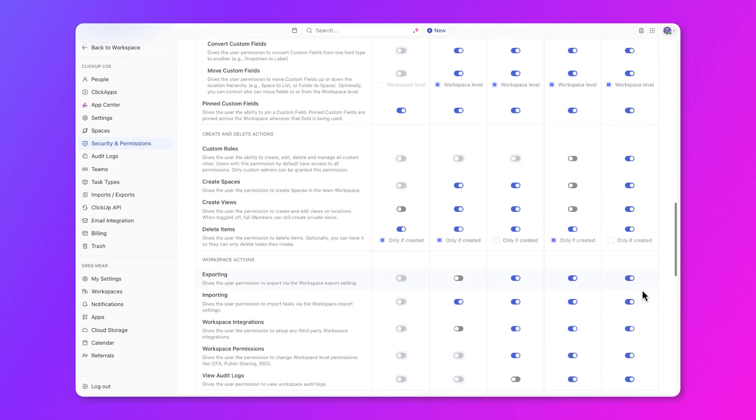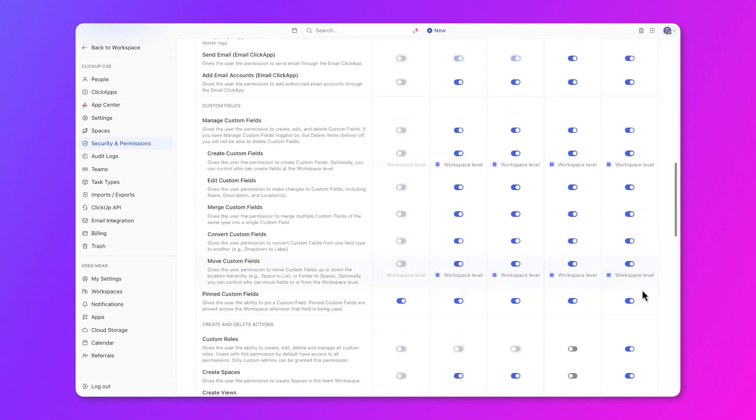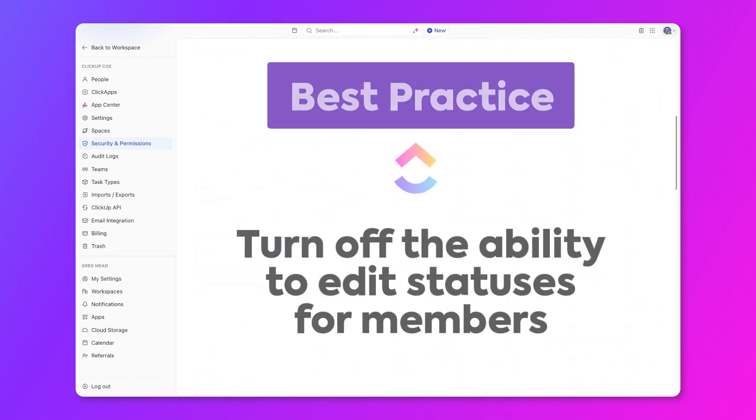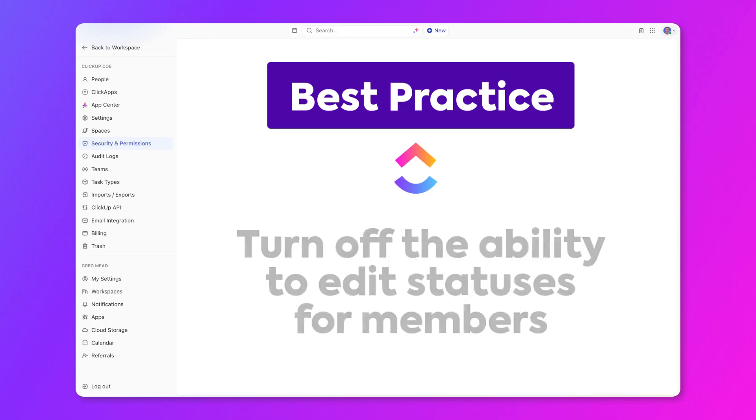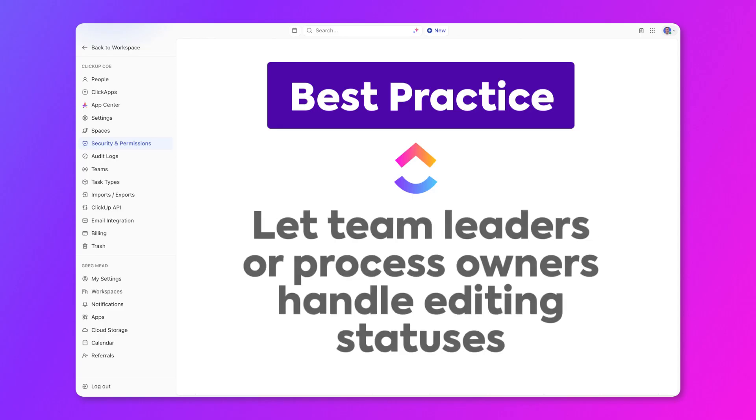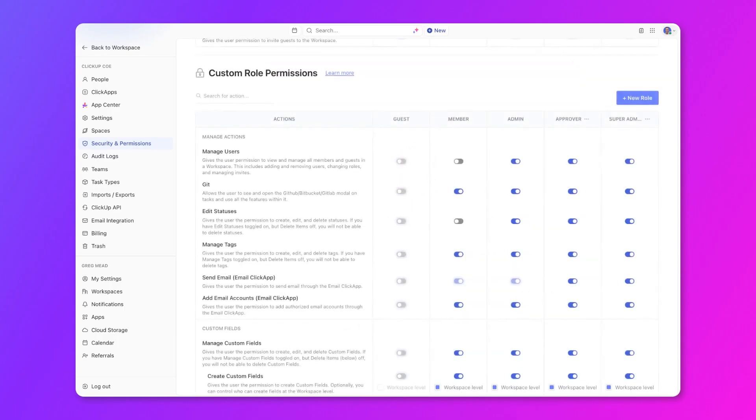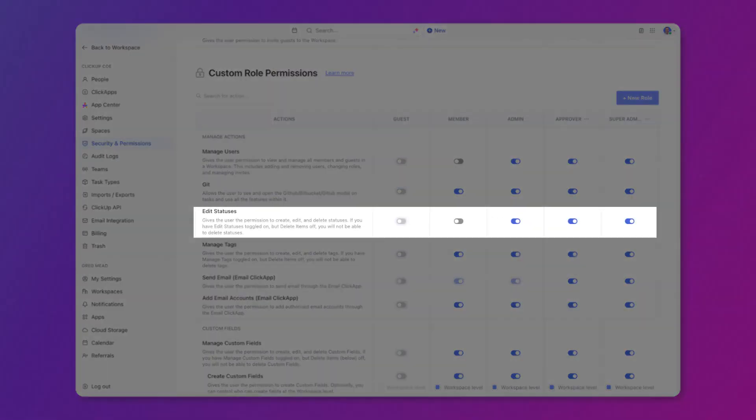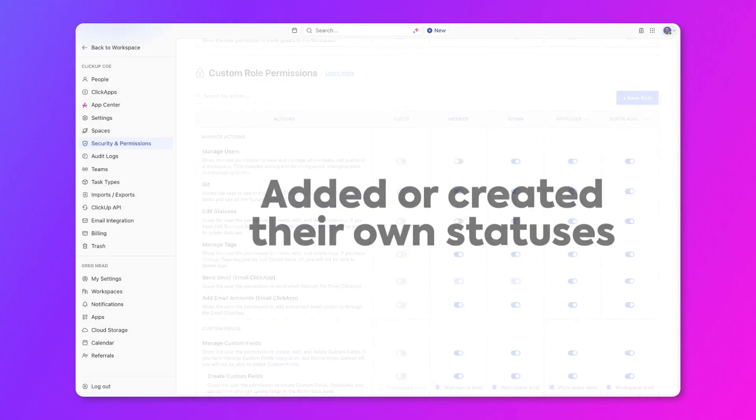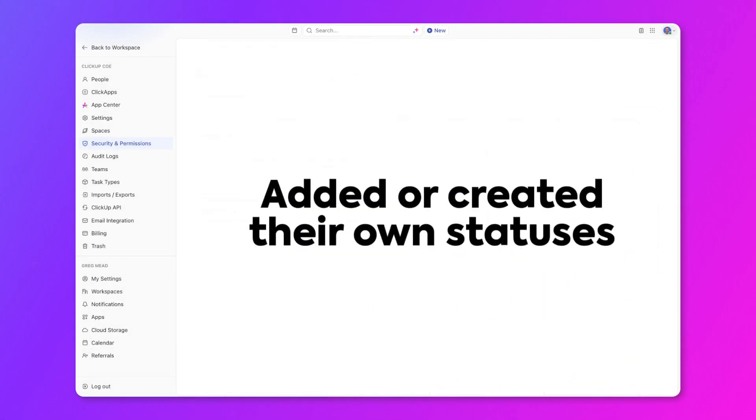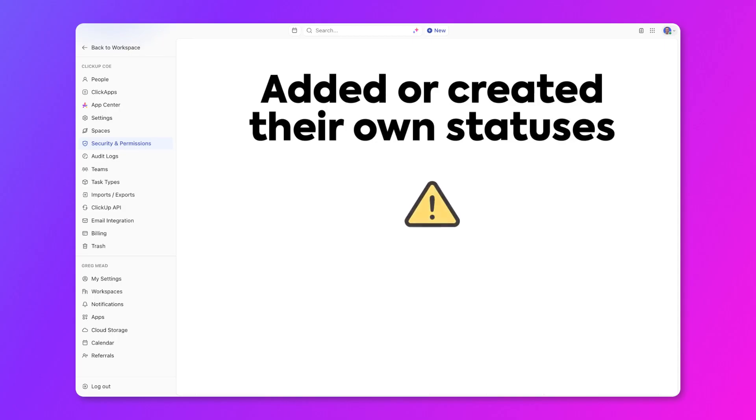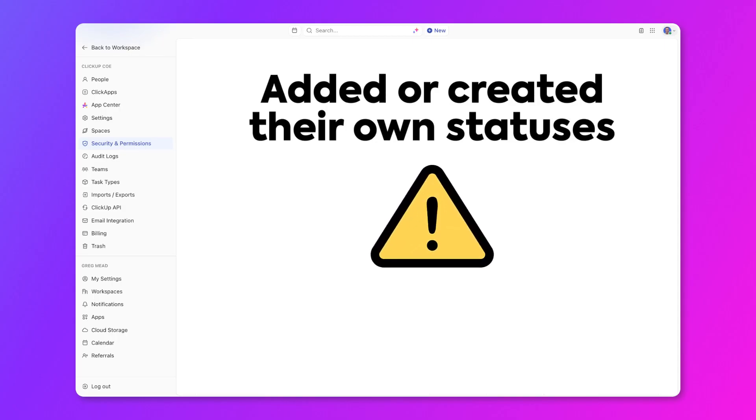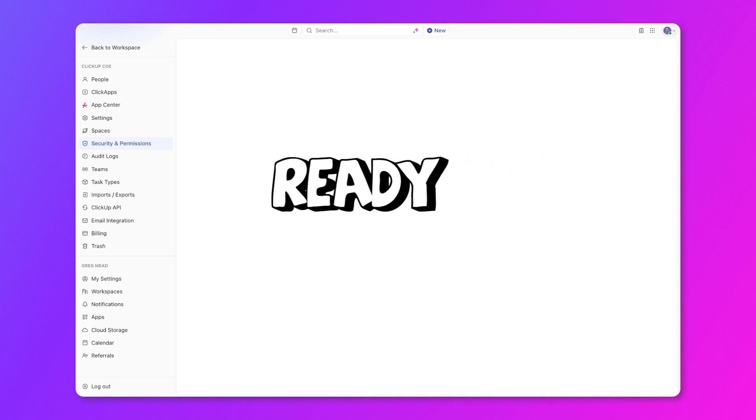Let's talk about some best practices for custom permissions to help you further secure your workspace. First, turn off edit statuses for members so you can keep your statuses limited and simple. Only let team leaders or process owners, typically admins or custom in-between roles, to be able to edit statuses. This will keep your workflows so much cleaner. Let's say one of your designers finishes a design that's now ready for review. If they were able to edit statuses and then added or created their own status without consulting the team or the team lead, it could throw off the team and the workflow and create more confusion.